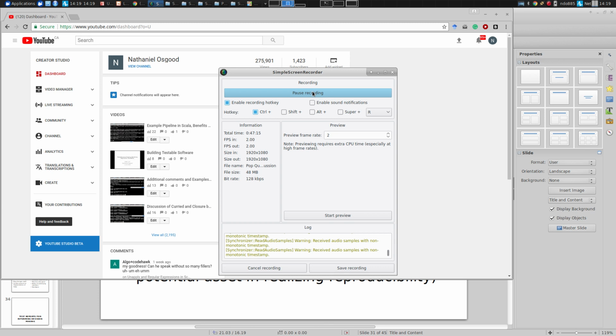Contingency planning, how does it differ from that? Contingency planning is almost like an after effect of risk mitigation, where if you have something that is likely to fail, even with your safeguards, then you should have a backup plan. Good. Yeah, so it's all about having a plan in place. And in this sense, it's proactive. There's a proactive element of that.